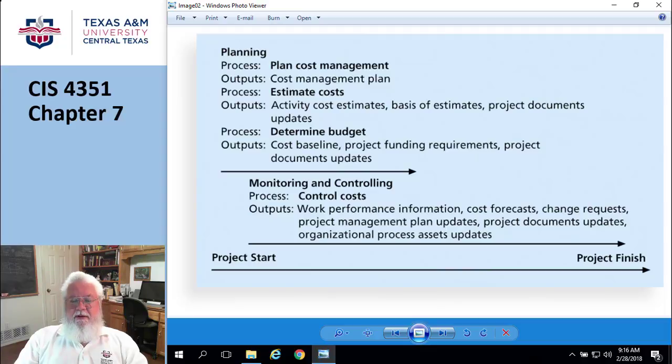Another thing about intangible cost is, what happens if I piss off my customers and they quit buying my product? Or even a weird one. I have seen one of these where there was an intangible cost associated with we're working this group of programmers and we're behind schedule, and so we're paying them overtime. They're working 10 hours a day, for 6 days a week, and we're burning these guys out. And so is there a cost associated with burnout? Oh yeah. Their productivity is going to go down. They're going to need lots of vacation at the end. Maybe they're going to leave your company. Yeah, intangible. Okay, let's keep going.